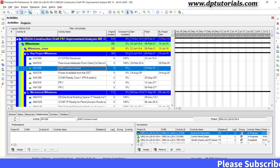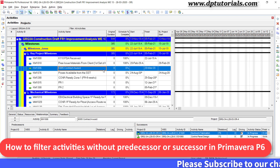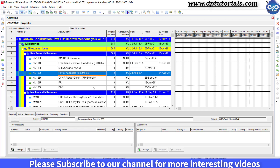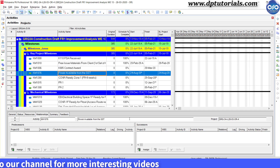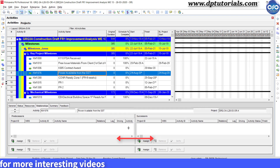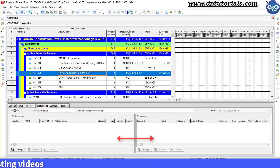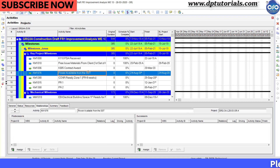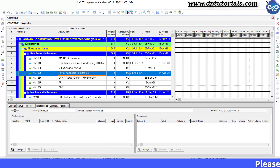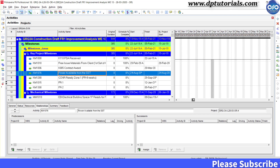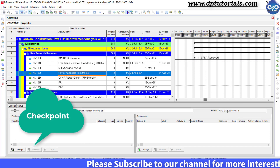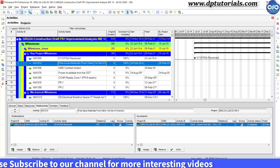I got a request from one of our friends asking to show how to filter activities without predecessor or successor in Primavera P6. Activities without predecessor or successor in a Primavera P6 schedule are known as Open End Activities, and as a best practice of scheduling, we should avoid these open ended activities in any schedule. This is one of our checkpoints for any schedule. Let's see how to do this in detail in this tutorial.